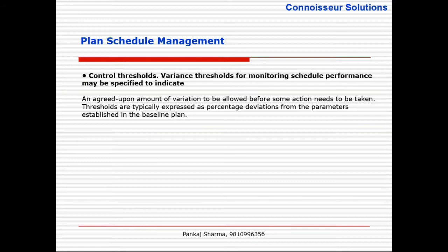Yeah. Any variance should be escalated. Escalation should always follow a basic principle called management by exception. Now, what is an exception? Whenever you give estimates of any project, never give estimates as a single point. Always put estimates in some range. For example, the project might complete in 12 months plus minus 2 weeks. We should also always give a buffer. This is not a buffer. This is unpredictability. Buffer is separate and tolerance is separate.